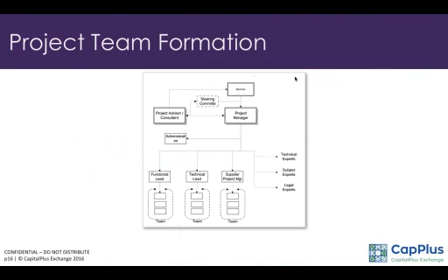One of the first tasks in the project planning phase is setting up of the project structure. You need to set up the structure, and this has to be agreed upon. The slide shows a functional team structure where the project team is organized and grouped by functional area, so responsibilities can be assigned by functional input. The system conversion can be a cross-functional project, not just the responsibility of the IT department.